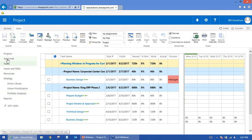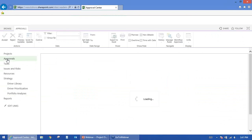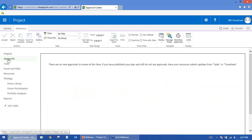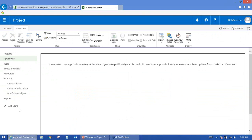The Approvals section is for project managers. When a team member submits updates on the tasks they've worked on, the project manager can click on Approvals, see those submissions, review them, and decide whether to apply them directly to the project schedule.